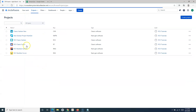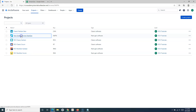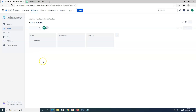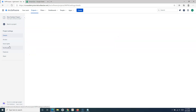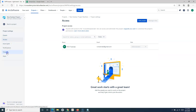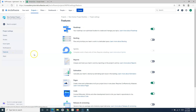Now let's go back to the next gen Kanban project. I have selected the next gen Kanban project, and here as well I don't see any backlog option. So let's first go ahead and enable it. To enable that option, we have to go to the project settings in the next gen Kanban project, and then we need to go to the features. Once you are in the features, you will see that there is a toggle to enable the backlog.